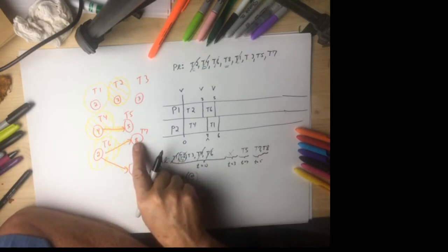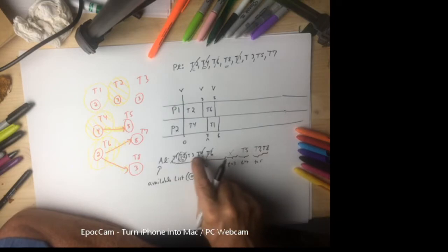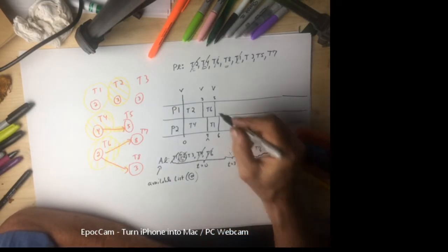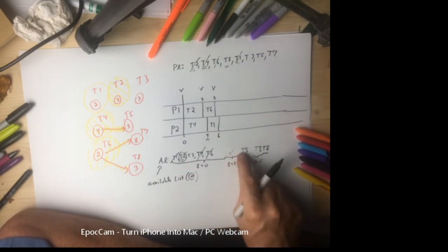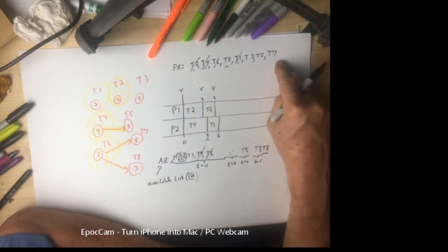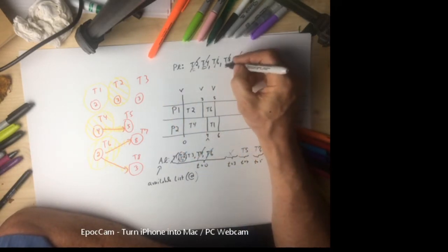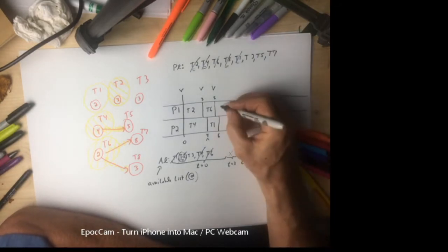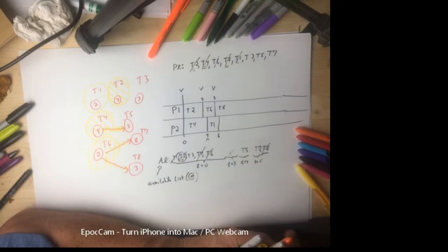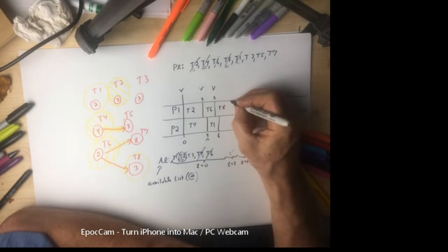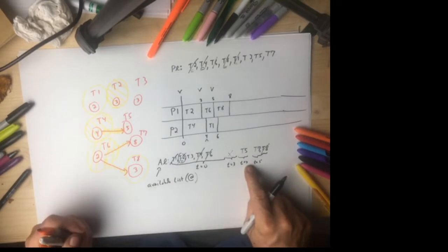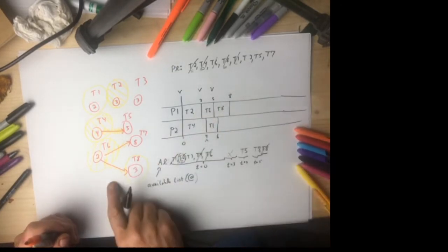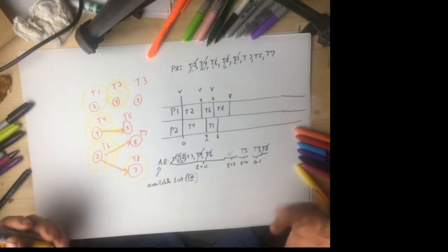Available, available, available, available. Why, we have 1, 2, 3, 4 available tasks. One person at 5 o'clock is waiting for a job. So, amongst 3, 5, 7, and 8, what does this say is the most important? T8 is the most important, so I'm going to assign it. T8 is going to be dropped in for 3 hours. 3 hours plus 5 will make 8 o'clock. I updated my available list. I updated my priority list. I updated my digraph. Time for the boss to take a nap.